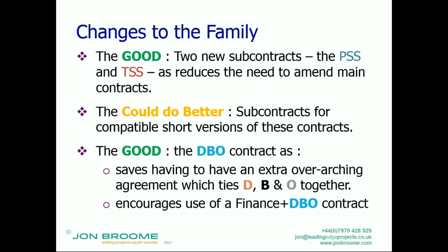The engineering construction contract in black can have contractor design, so it could be that the design is within there, but it doesn't really cover operate. So whether it's 3 or 2 contracts, I've got to somehow weld them together with an overarching agreement, and then I've got to look at these individual contracts and take out and tweak clauses, etc., so it all fits together.